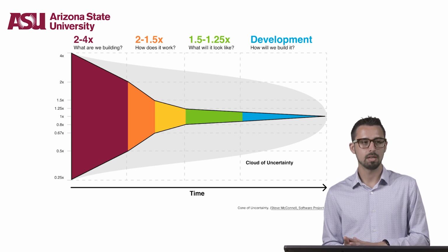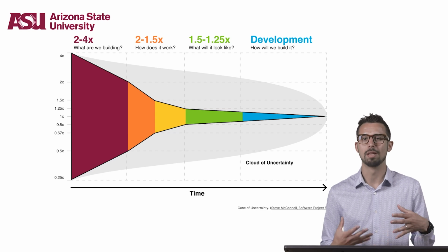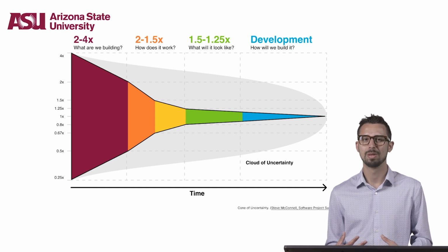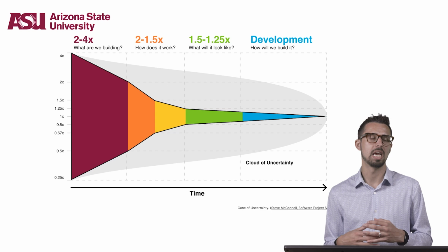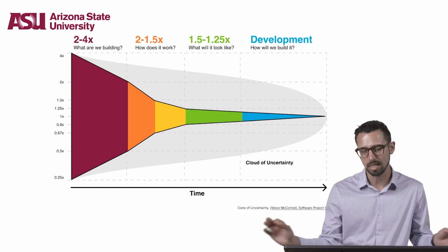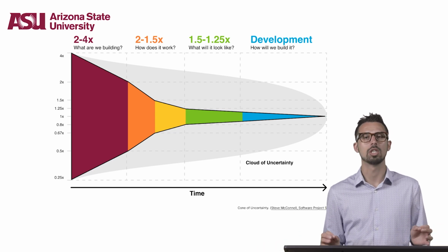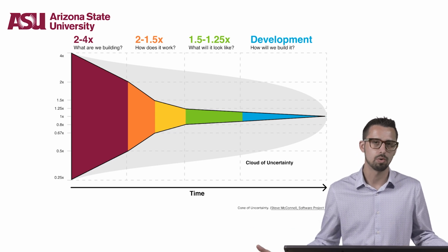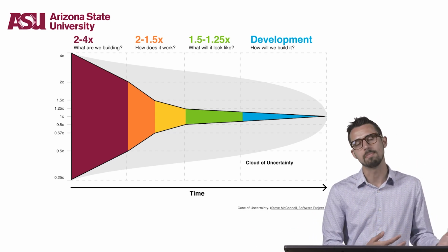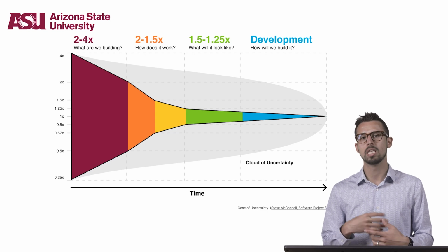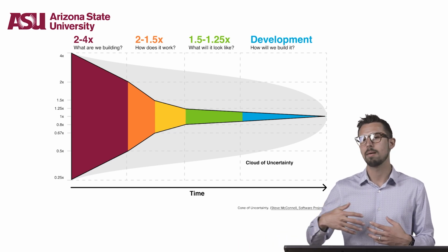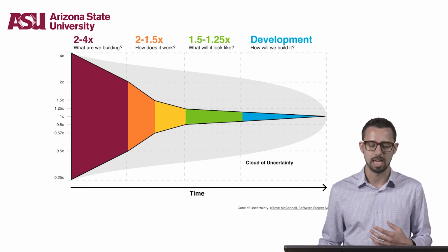Leadership often wants to know when the project is going to be done. Once the team establishes a slightly reliable velocity, such as the average number of stories or tasks that the team can complete in an iteration, the team can then predict how much longer the project is going to take.